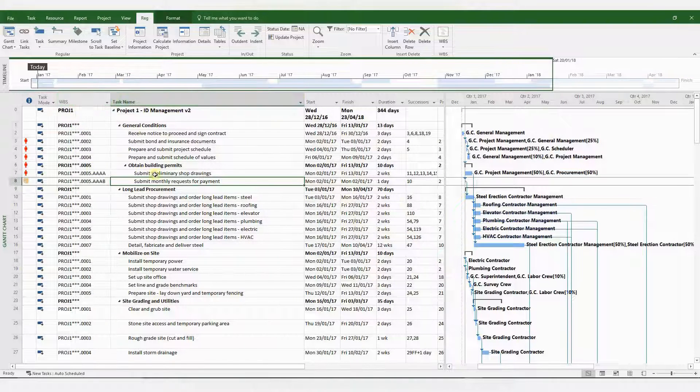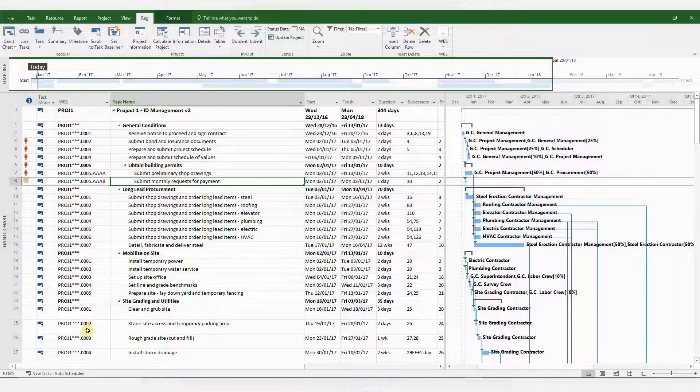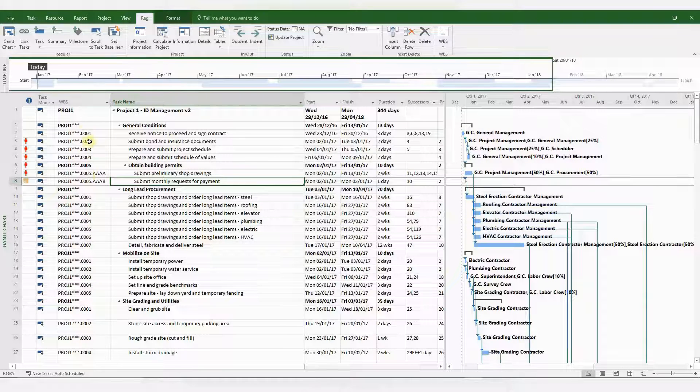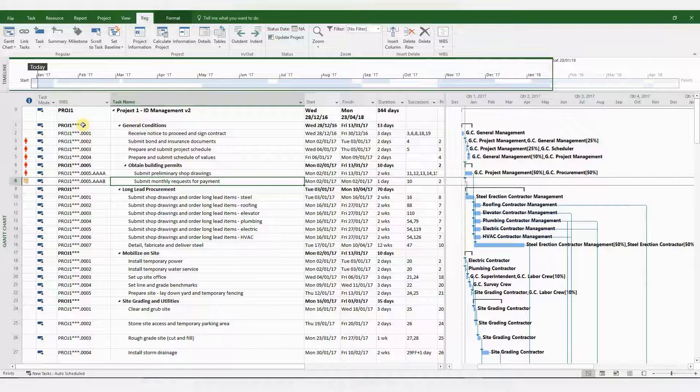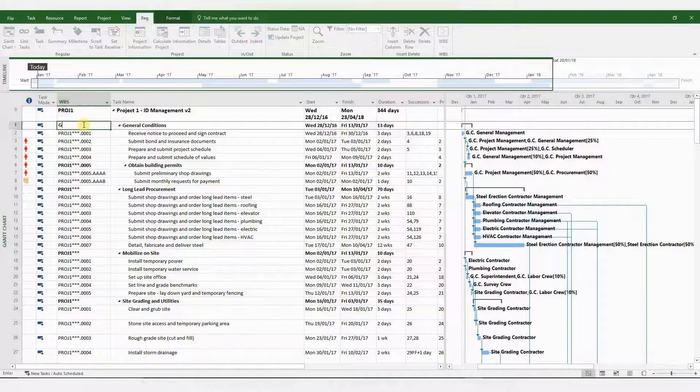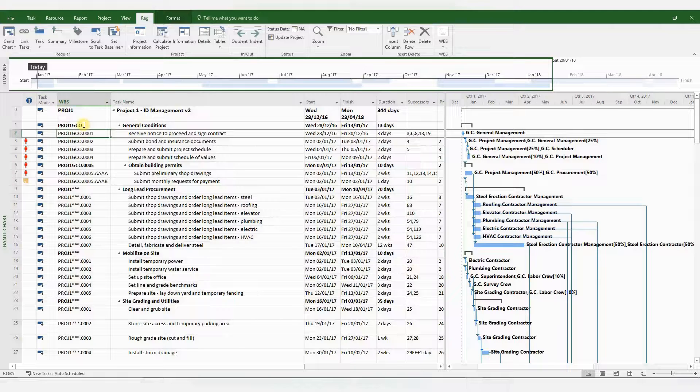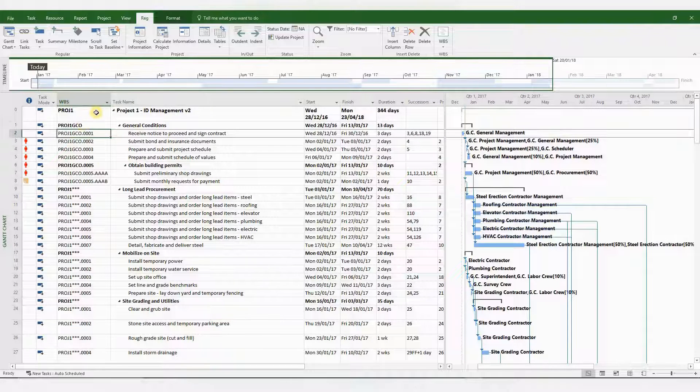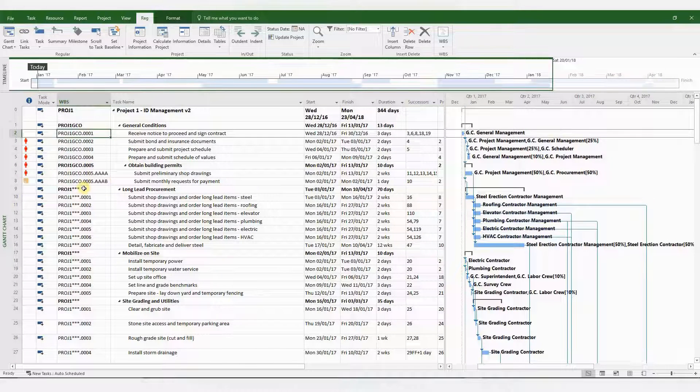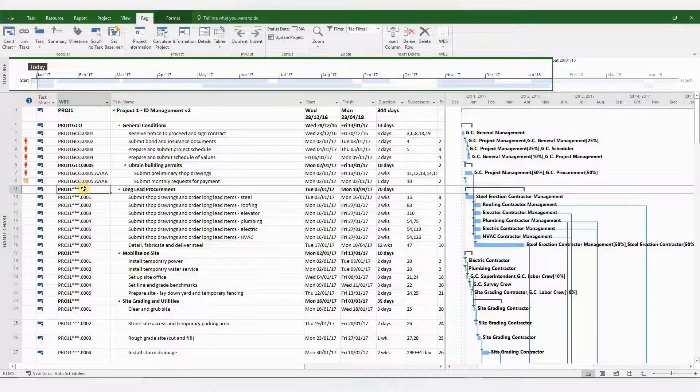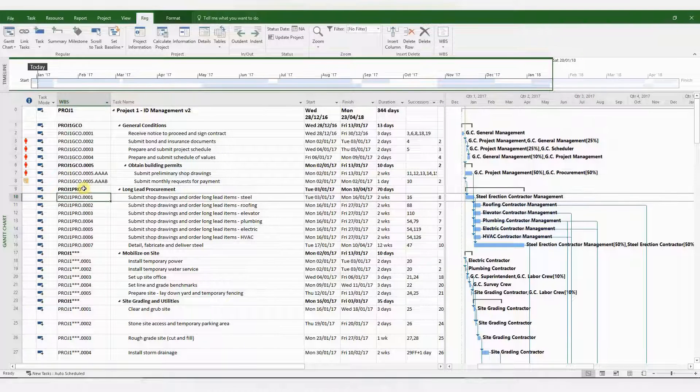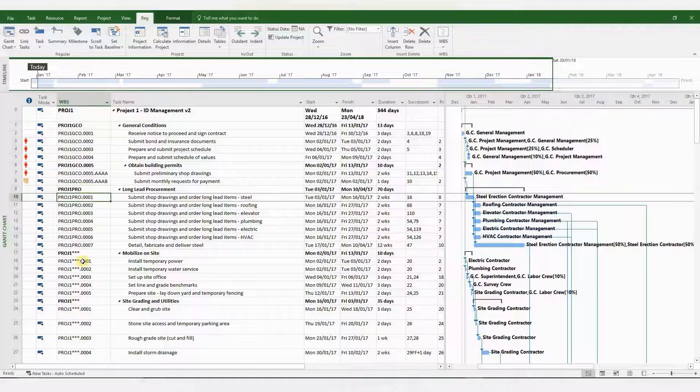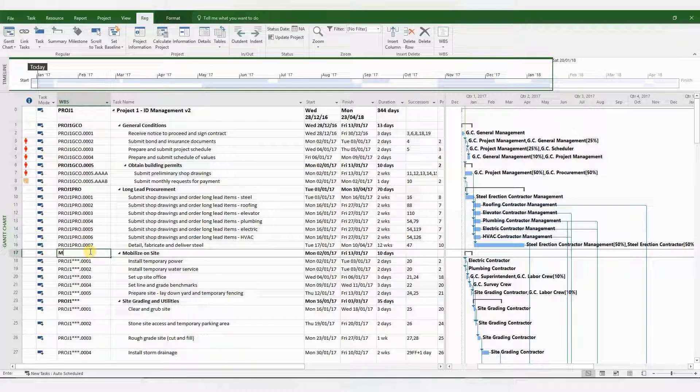And now the asterisks can be changed to suit your summary bar. So for the first one, it's general conditions, so I'll call it GCO. And everything has been recoded. Now for the next summary bar, you have long lead procurement. I'm going to change that to PRO. And it's been changed. And you can do the same thing for all the other summary bars.